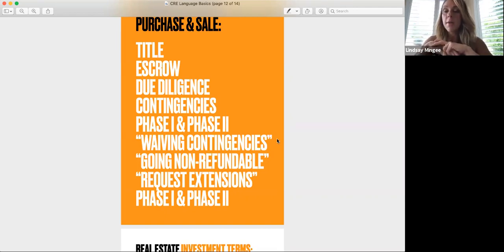That's a term we talk about a lot. Oh, it's going non-refundable. Well, I have to finish, I have to get this phase 1 because I go non-refundable in 5 days. I've got to review all these leases because I'm going non-refundable at the end of the month. What that means is your due diligence period is expiring and that deposit you put in now goes to the seller, whether or not you ultimately decide to buy the property or not.